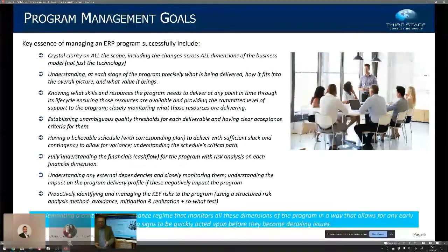That's true, but it's not hard to measure, because you can secure the services of an external advisor to look at the quality of the output and to say, yes, that meets industry standard practice, or it meets industry advanced practice, or industry leading practice, depending on what threshold you're trying to meet, or it doesn't meet what we would ordinarily expect a deliverable of that nature to look like. And therefore, our recommendation to you is to ask the supplier to fix it in these ways. Now, that's what good assurance is about. That's the meat and potatoes of good assurance.